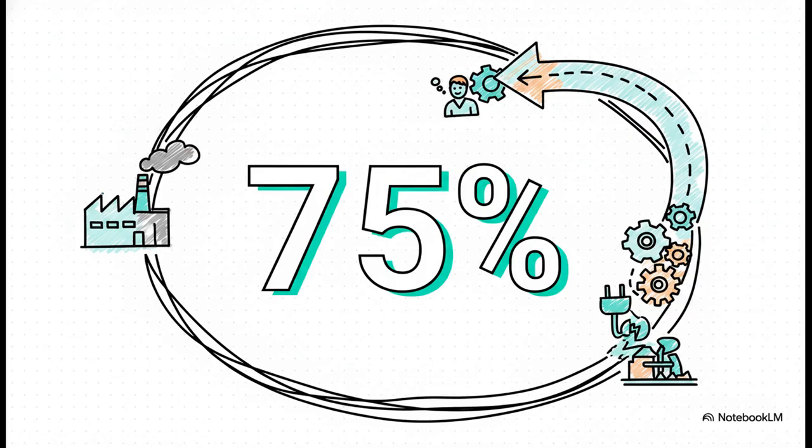If your business case only looks at the upfront capital expenditure, you are literally ignoring 3/4 of the actual financial reality. That 75% includes things like 30 years of expensive software licensing renewals, massive HVAC energy consumption, facility management staffing, routine maintenance, and eventually, decommissioning. You've got to account for the whole shebang.